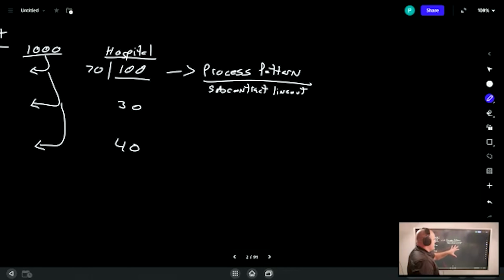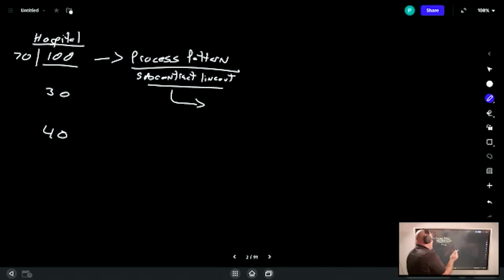And what I want you to focus on is not that we're creating a subcontractor lineout process, but that we are identifying a gap between estimated and actual executed labor. We're using root cause analysis to figure out why that occurred. And then we are putting a process in place that we are going to train our team to. We're going to train our team and we're going to document our process. And then that's what our team does going forward.